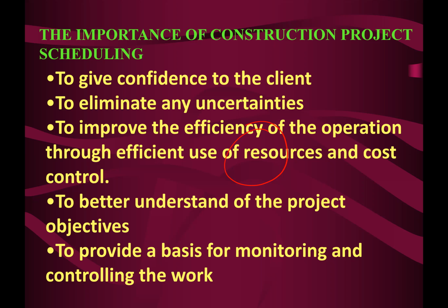Then, to better understand a project objective. The issue is that if you are given a project such as a bungalow, at the end of the day, to construct the bungalow, you break it up into smaller units so that all those activities and tasks can be measured.